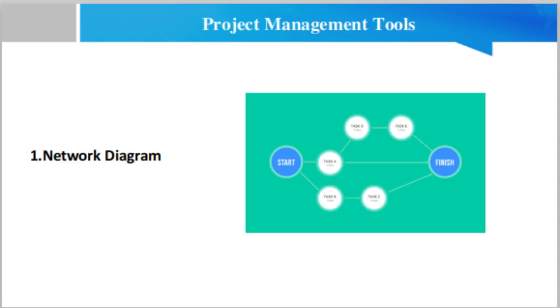task. The first two are the start dates. The first date of these two is early start, which is the earliest date on which the task can be started. The second date is late start, which is the date on which the task absolutely has to start if it has not already. This same logic goes for the latter two of the 4 dates mentioned above. These are the end dates.